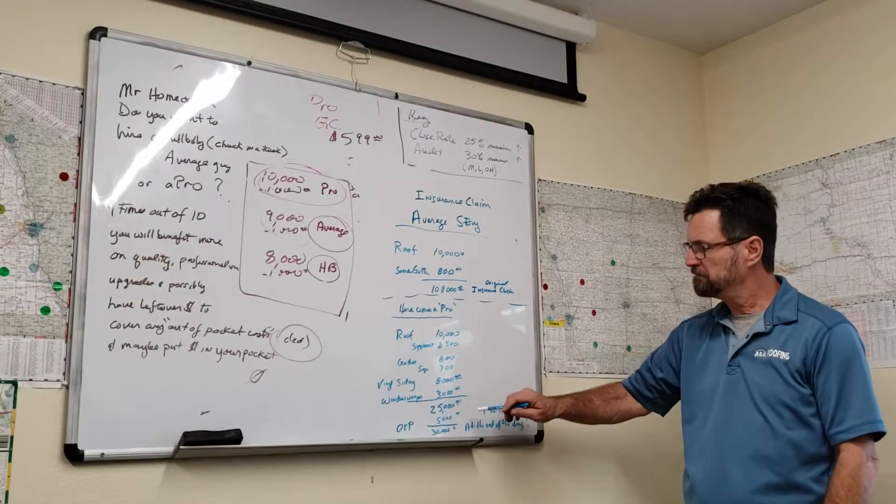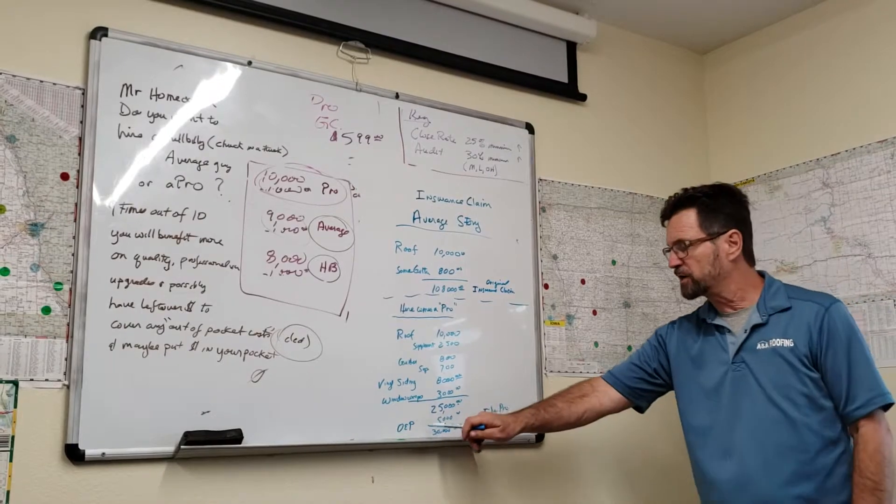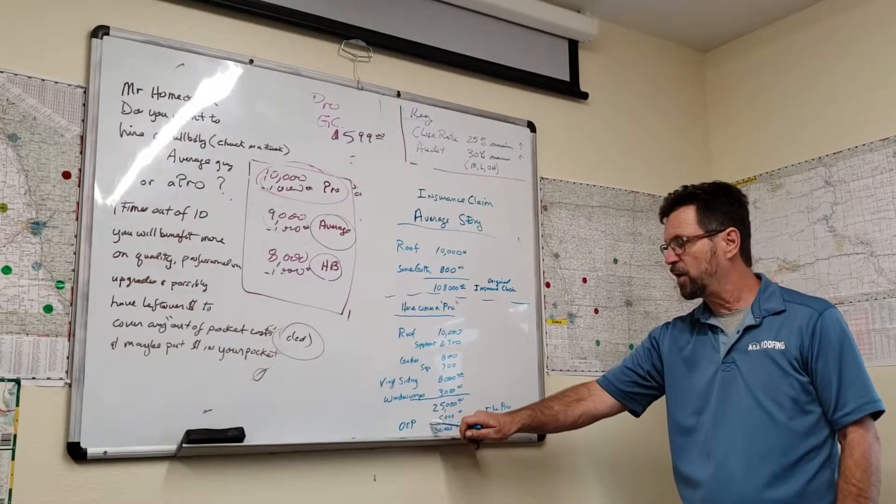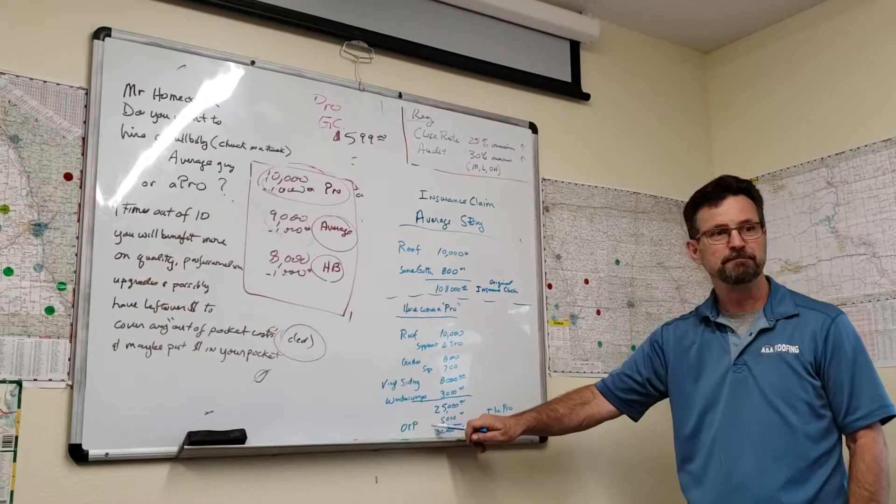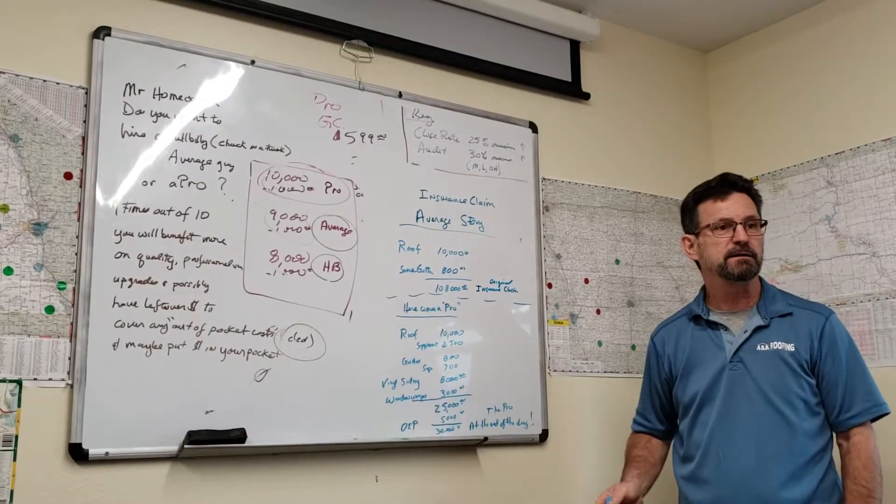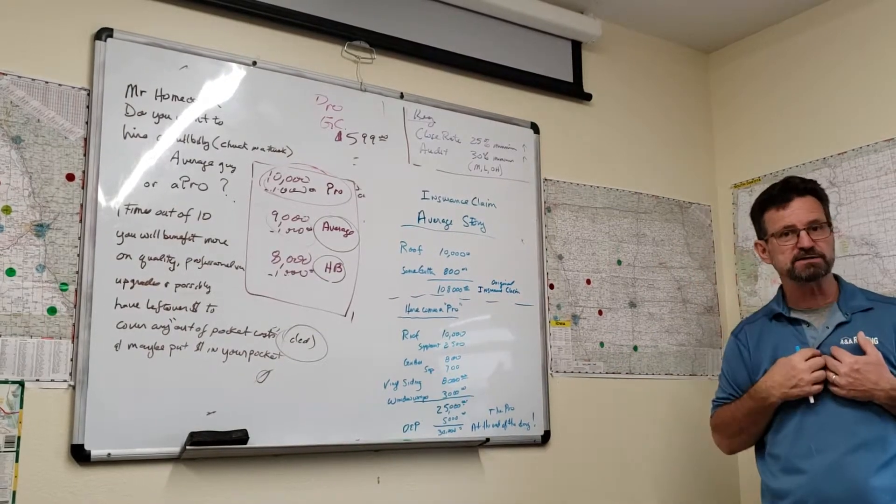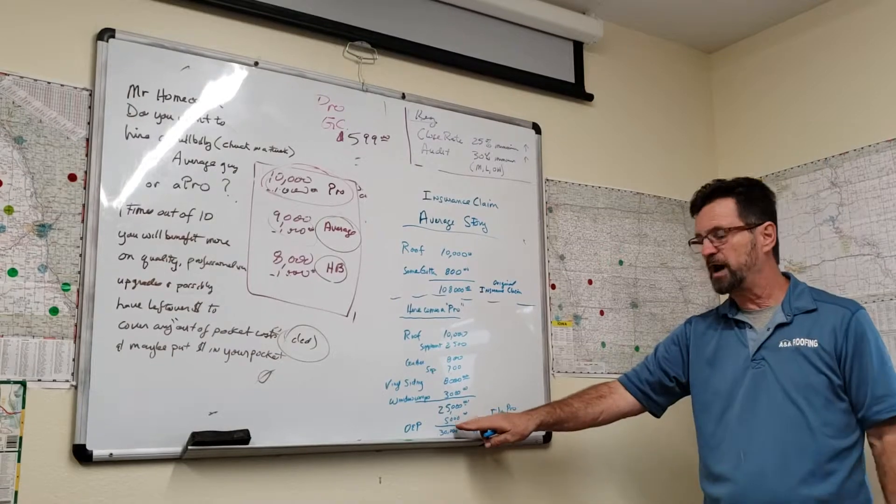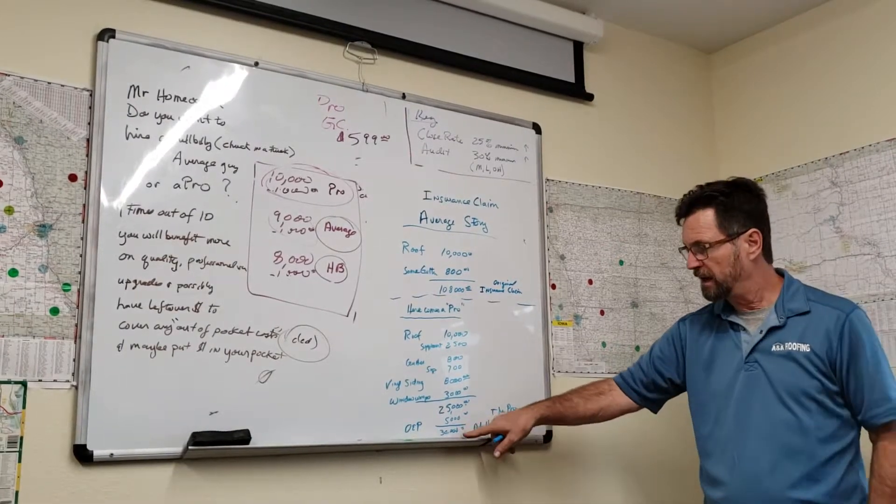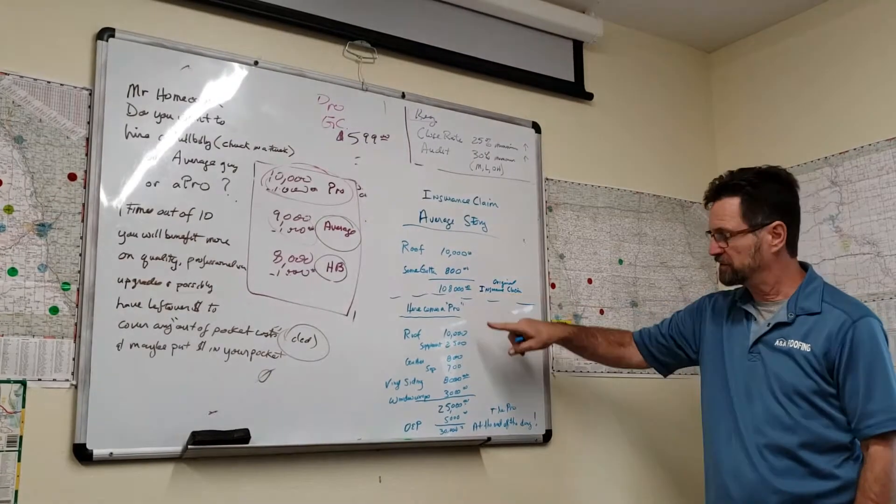When we were done, we ended up with a $25,000 claim. And as general contractors, we are paid overhead and profit because you can't run three or four trades profitably with insurance pricing and make a profit. So the insurance companies will pay us, professional general contractors, an extra overhead and profit to manage the project. Now the claim is a $30,000 claim. We went from $10,800 to $30,000.